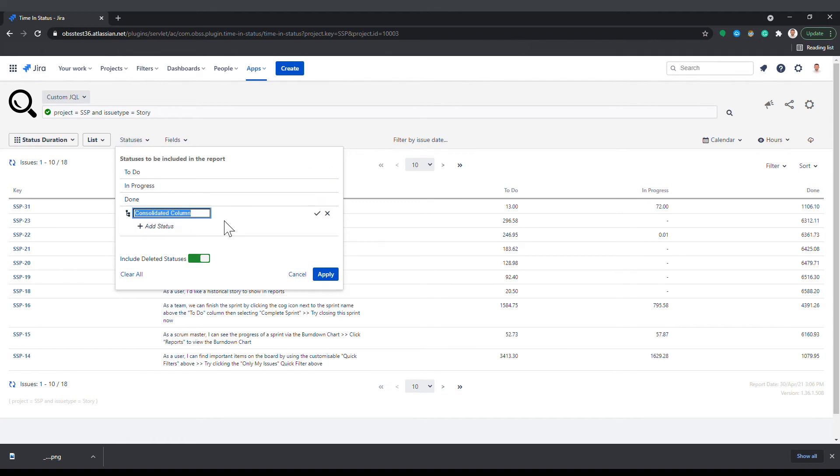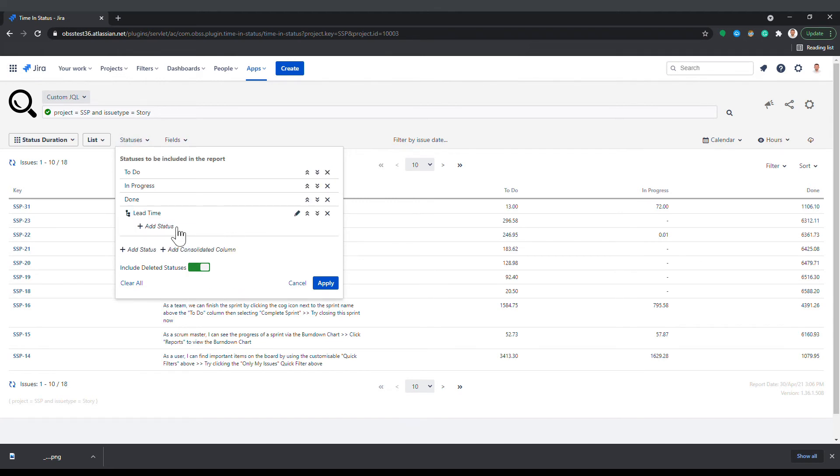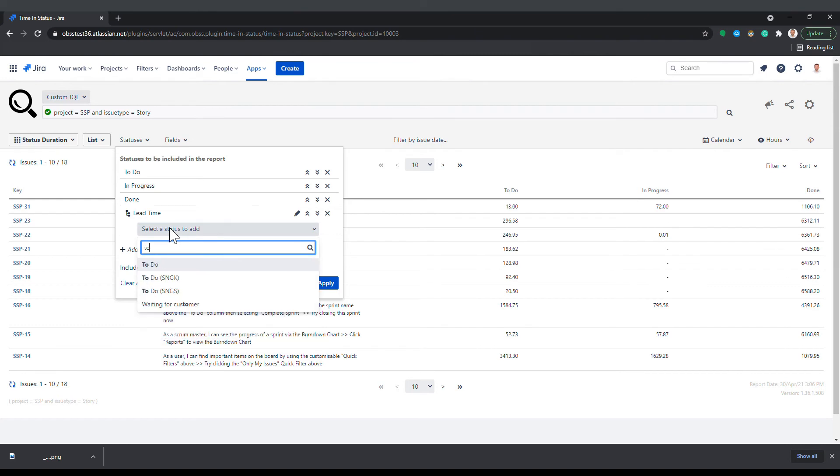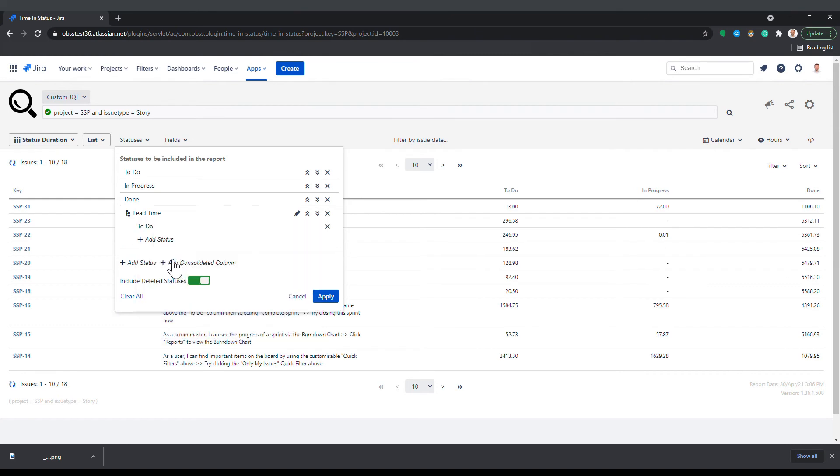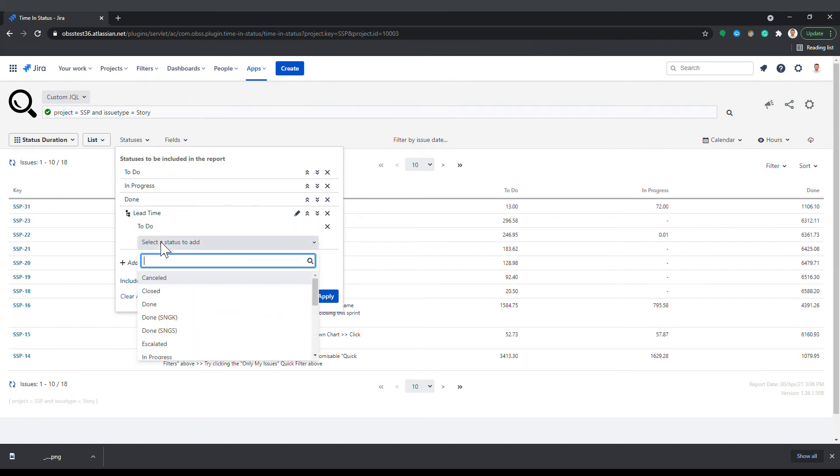For example, you can create a consolidated column named lead time and put to do and in progress statuses under it and see the lead time of each issue.